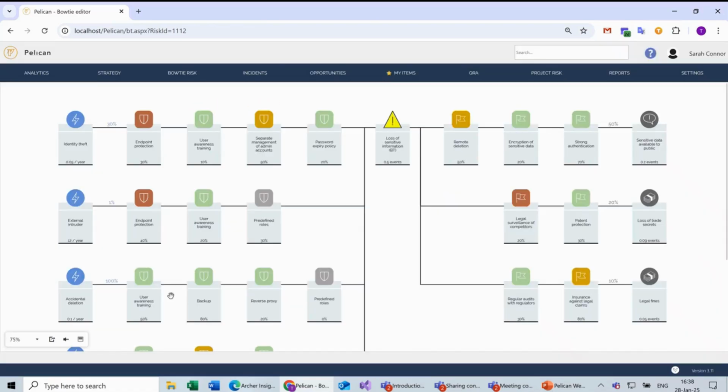The other objects on this diagram are control procedures on the left and mitigation strategies on the right. The control procedures are implemented to reduce the chances of the risk event, given that there are these drivers. So for each driver, we can implement several control mechanisms, each of which has a specific probability of success of stopping this escalation from the driver to the risk event.